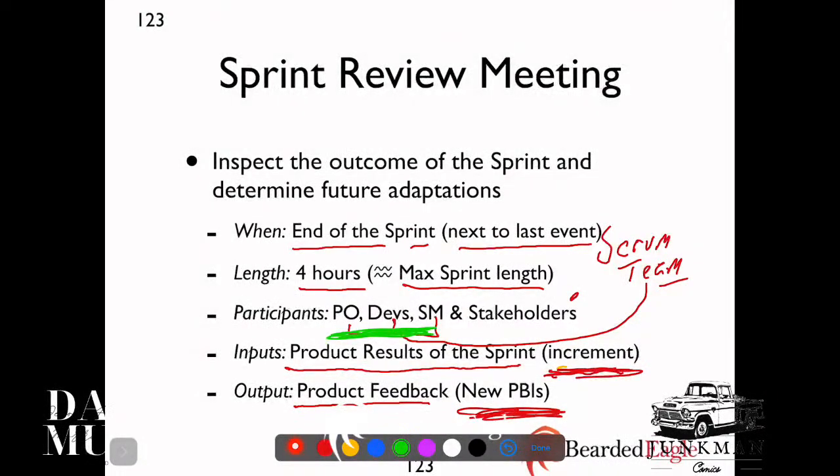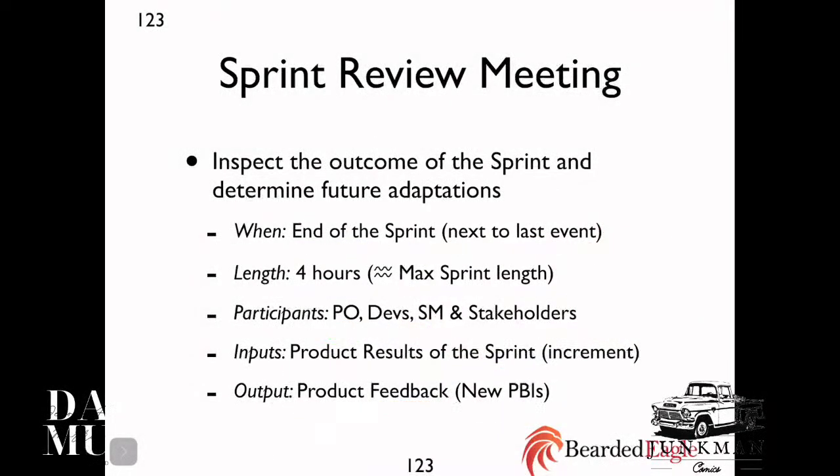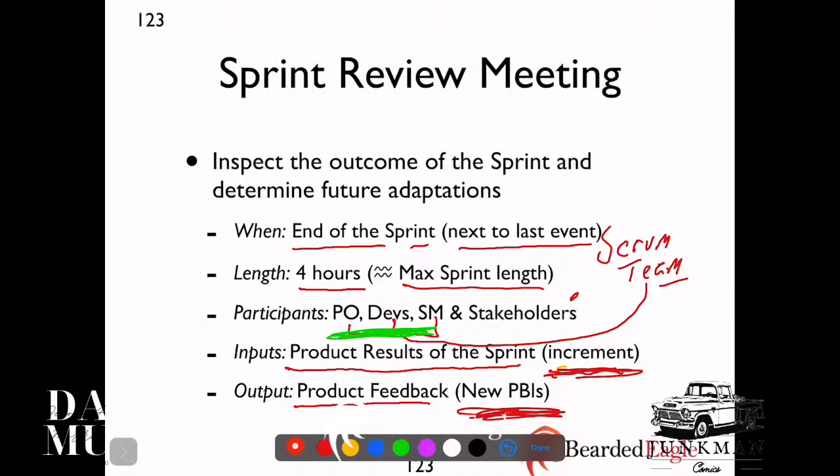Right? When you look at this, what am I missing here, people? Because this is all the sprint review is. It is nothing more than that. It is not the same as the retro, because the retro is about getting process feedback. It shouldn't happen at the same time as the retro because you're inviting stakeholders in the room. Stakeholders coming in the room means you throw everything off, right? Especially if you're talking about how you're going to improve the process related stuff. So it's a very different thing to do this sprint review.